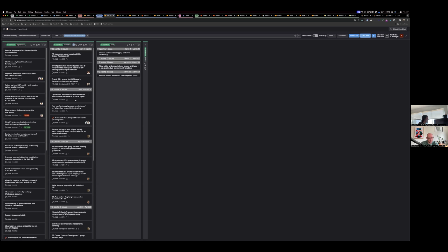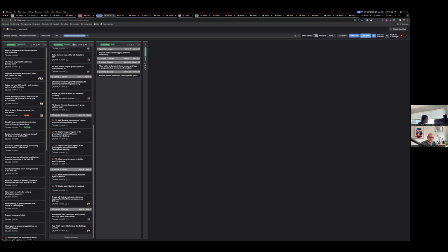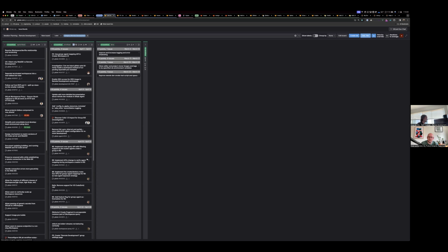But once it's refined and prioritized over here in the prioritized lane, we have a sync meeting with as many of the team as can attend, and we go through everything that doesn't have a weight, and we rock, paper, scissors. We discuss it, make sure nobody has any blockers or some information that the person who refined it doesn't have, or it's like, oh no, that's going to be a death march, or oh no, you don't want to do it that way.